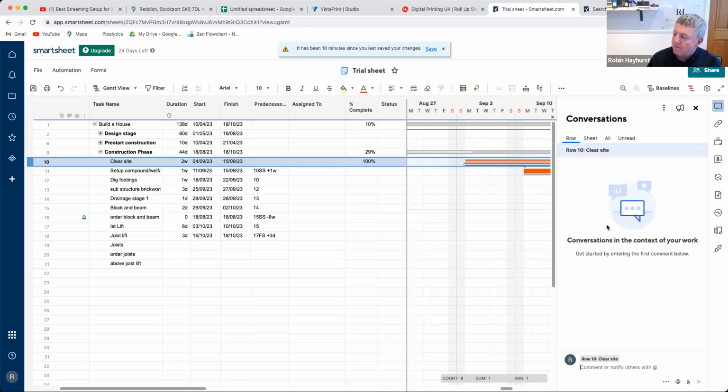Well, if you remember, a program like this isn't something you leave in the drawer, you're actually looking at it every day. It's a bit like your daily diary. So the idea is to move it every time. If you move it every time, you're keeping an accurate record of what's happened and how it happened. So when your client at the end of the job says, well, you're 3 weeks late, you can look back at your notes and say, right, okay, 2 days were because you didn't decide on the kitchen, despite the fact we gave you the date we needed it by. We've got another 3 days because doors weren't delivered, but you changed that order. And you can put all that information into this, and it will run a report on that.